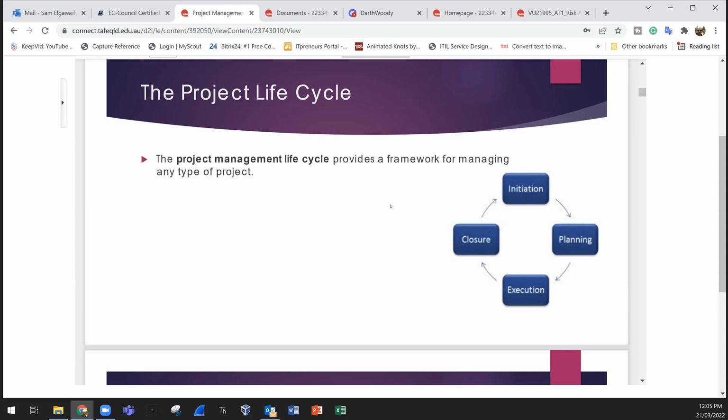The planning phase will cost me 10,000 or 50,000, because during the planning, we're spending money. We have people dedicating their time for the planning. We might need some resources for the planning. So some software, some license, some equipment, some computers, some place to work in, air condition, electricity, water, coffee, tea, all these things happening during the planning phase. So if the planning phase is 1 month, we will pay for 1 month of everything. If it's 1 year, multiply by 12.